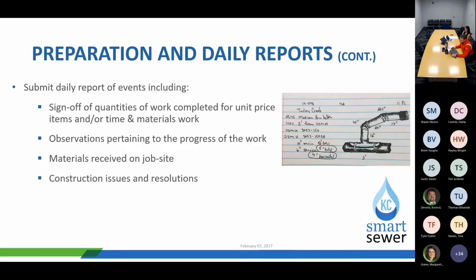Those types of reports, you can either have a justification for a time extension, or, hey, it was a sunny day and the contractor wasn't working today and they want extra time.